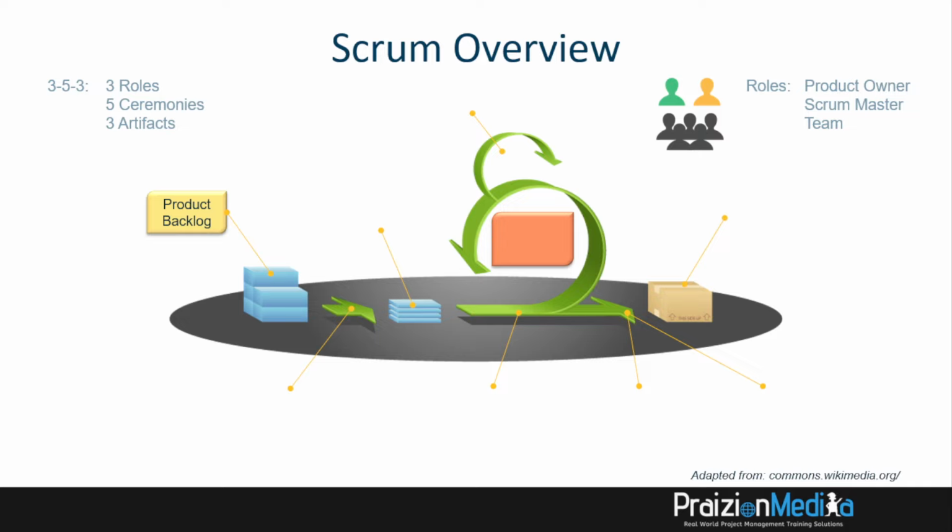So let's take a look. The very first piece here is a product backlog. Think about this as a list of customer wants, needs, requests, and so on. Next, let's talk about the sprint. It's a time box of 1 to 4 weeks, but each firm that adopts Scrum must decide what that duration is for each project. Once you've decided for a project or a product development, for example, to go on a 2-week, 1-week, or 3-week sprint, we don't deviate from that. So once we've locked into a 2-week sprint for a product or a project, that's what it is.